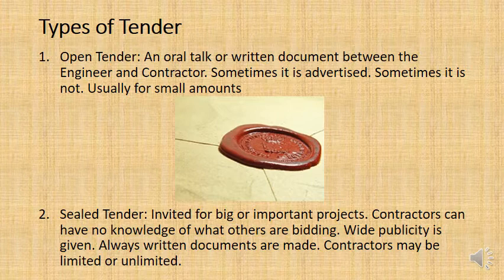And you then need to send out those documents to contractors who have expressed an interest in bidding for this project. And then they need to submit their bid, their tenders, and it's very important they deliver it by the deadline, and only at the deadline can you then open the envelopes and assess the tender documentation.